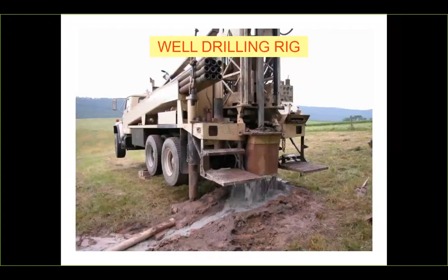inspecting the construction sequence for a well, you want to follow those inspection documents carefully. You want to encourage safety and stuff like that. So you want to know the type of equipment that is going to be used and how it's going to be used appropriately. For the most part, the biggest thing from this process that we want to document is a copy of that well driller's log. You want to have a copy of that when they're done. It's going to verify the depth that we're paying for, the well production levels, and that the casing was installed appropriately, the well cap and stuff like that.